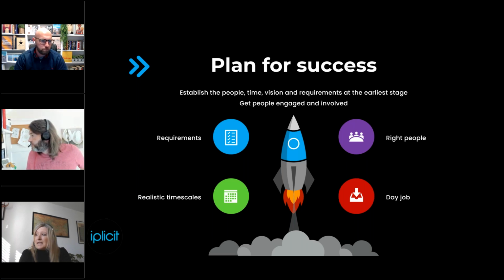One of the main things I ask when I do that project meeting is, what are your critical reports that you need out of your system? Because actually, you've got to look at what you want to get out of a finance or an ERP system in order to know what to put in it.